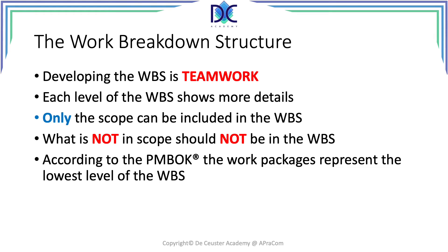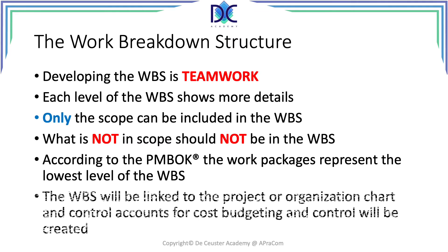When we look at the PMBOK, the Project Management Body of Knowledge, we see that the lowest level of the WBS relates to the work packages. So when we are decomposing the project, we will not go further than work packages. We can also link the WBS to the project or organizational chart to create control accounts for cost budgeting and control, leading to an Organizational Breakdown Structure.